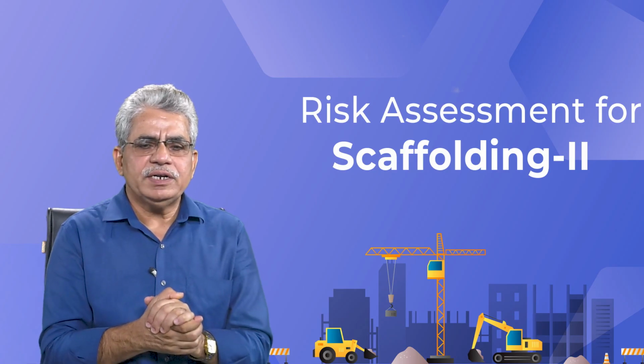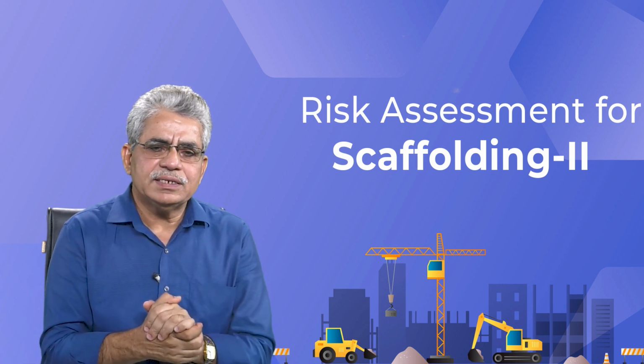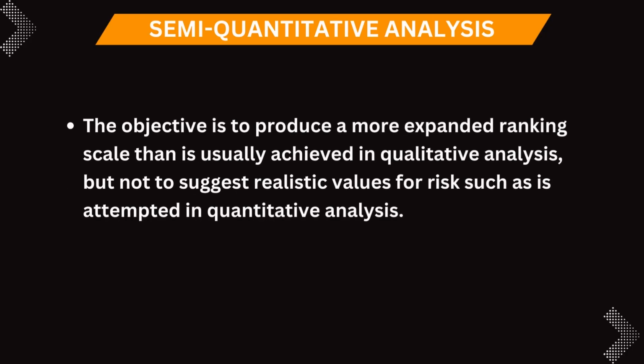Next is semi-quantitative analysis. In semi-quantitative analysis, the objective is to produce a more expanded ranking scale than is usually achieved in qualitative analysis, but not to suggest realistic values for risk such as is attempted in quantitative analysis.